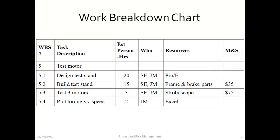A work breakdown chart is a common artifact in project management. Here, the task 'test motor' has been broken down into four subtasks. Also shown on the same chart are estimated person hours, who is assigned to the task, what software tools are to be used, and the cost of the necessary materials and supplies.